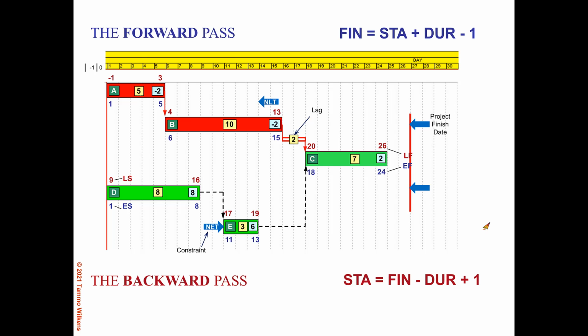And this leads us into a discussion of critical path. And PMI, unfortunately, adds some confusion to that by the terminology, and I will be covering that in another video. So we have here a critical path on A and B with negative float, and we have a non-critical path, D, E, C, with positive floats, even though activity C is determining the project finish date.